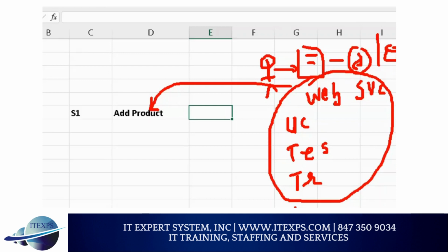32. 16, and I have two people, so 32 hours. It means this story task should be 32. But what if it is 40? Then it's not a 1 point, it is a 2 point story. That's called negotiation. Make sense?